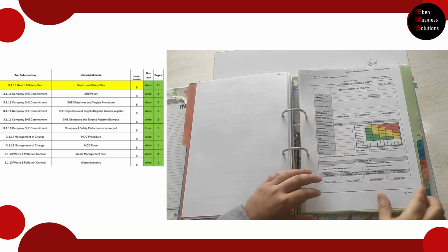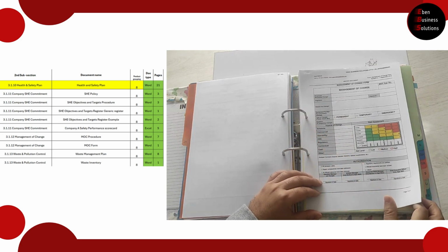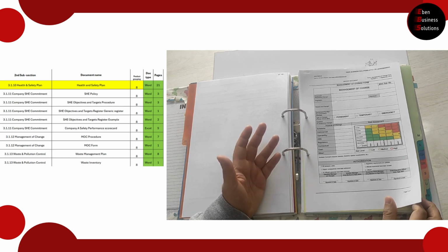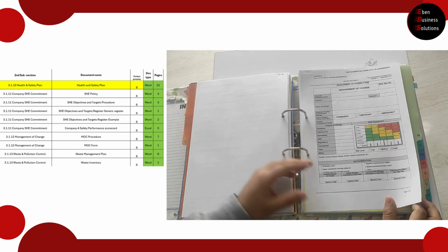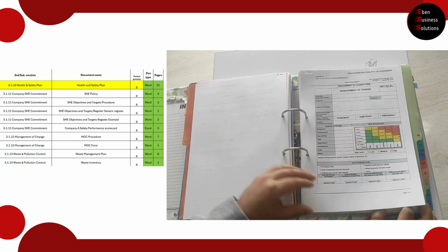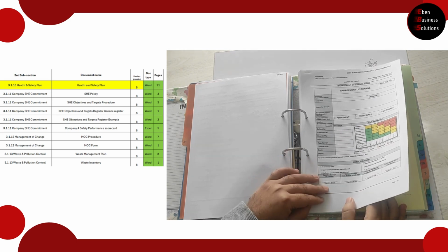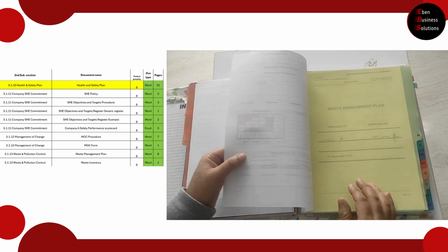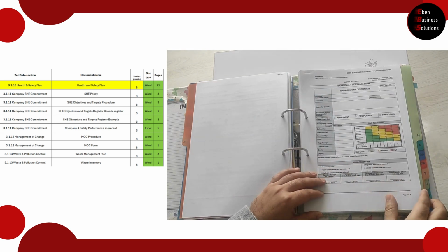And this is then a management of change form where you assess, is the change permanent, temporary, or because of an emergent situation? And then you assess to highlight what is the risk of this change and the impact thereof. And then you get it signed off to ensure that in the future, if something ever happens, you can always communicate to the auditors that you had performed a well-managed change management process.